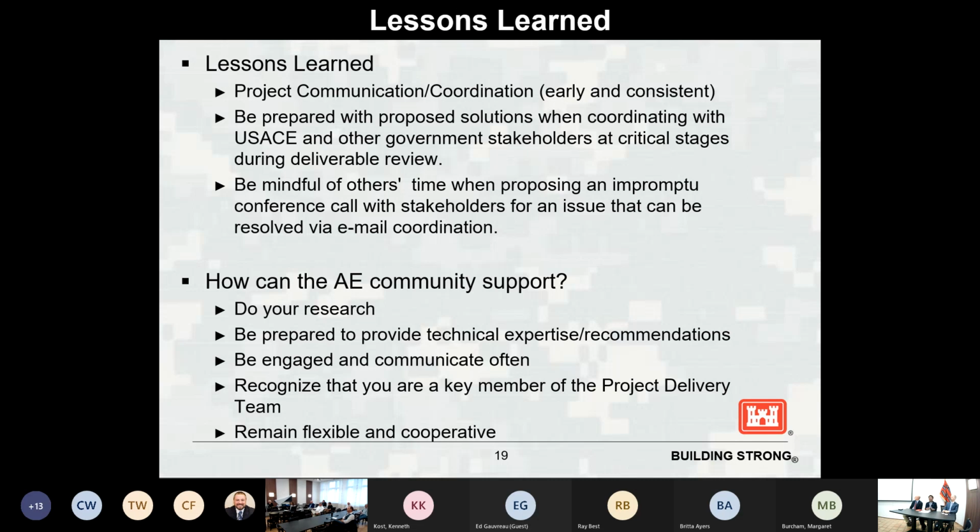One of the trends over that time is that we've gotten a little more general in our agendas. We like to see that get a little more specific, because then you're not getting there and trying to adjust someone's schedule. You already have that time locked in for that discussion. And then you don't have to keep shifting to see if it's possible that we're going to meet everyone in this time frame, because you would have already had that scheduled for all of the elements that you need to talk to while you're there.